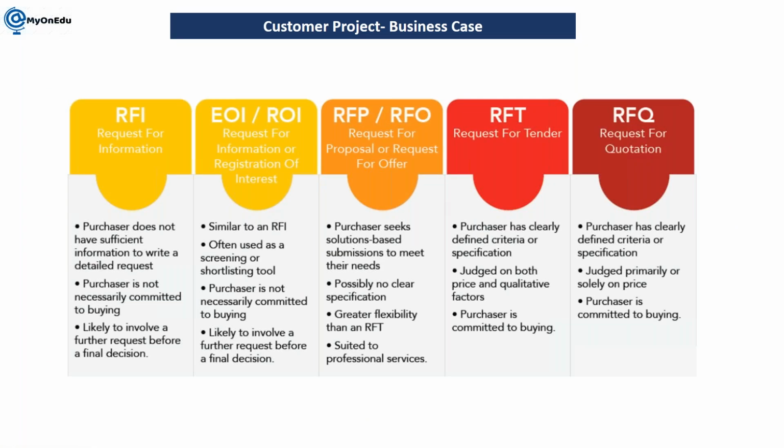Here I have taken some terminology. What is an RFP, request for proposal? What is an RFQ, request for quotation, which I have included in my previous slide. The major difference between RFQ and RFP: if the customer is clear exactly what they are looking for, they can mention all the details in the document, which we call an RFQ. If they are not clear, then they will include it in an RFP.